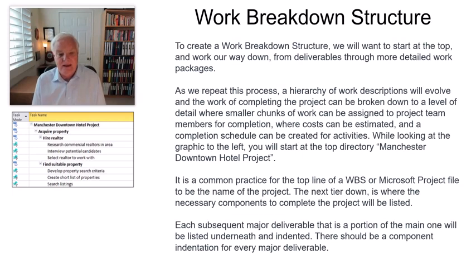So each subsequent major deliverable that is part of the main one will be listed underneath and indented. So there should be a component indentation for every major deliverable. This is the structure that we create when we're putting together the work breakdown structure in Microsoft Project or a software package of some sort.